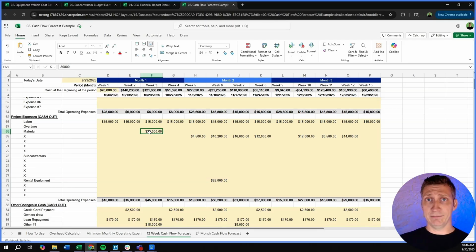This is important to keep up with your accounting. So what this shows you is, when do I owe these materials? And maybe it's net 30. And I want to pay people in net 30, but if I'm not paid until net 60, I can't keep paying people net 30. Otherwise, I'm on the hook for everything. And that's a whole other topic, whole other video. We'll get into that another day, I'm sure. But just know I align these with the payment that they're coming through.